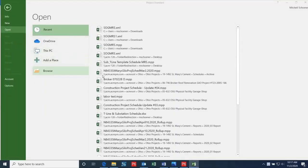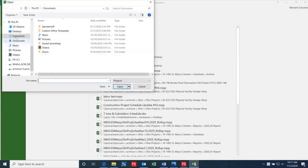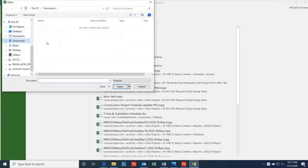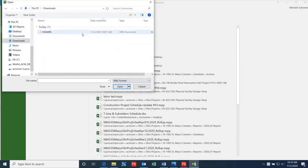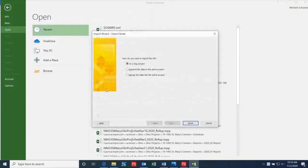Select the folder where you saved the document and click the Dropbox next to the File Name Text Box. This will bring up a list of options for the file type that you will be importing. In this case, I'm going to select XML format since the P6 file was exported as an XML file. Now we can select the file that we have saved and click Open.